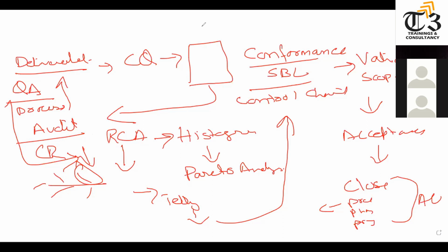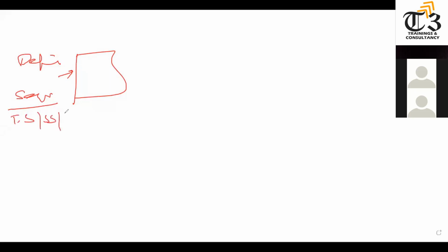While working on the project, you also have to make the schedule. What is the schedule? You have to define activities on paper somewhere, and then you have to sequence the activities. Audit with quality control tools? No, audit with quality tools. I didn't say quality control. Quality control tool is only one, which is inspection. So you define activities, and then you sequence activities based on the finish to start relationship, the start to start relationship, and we have the finish to finish relationship, and then we have the start to finish relationship.